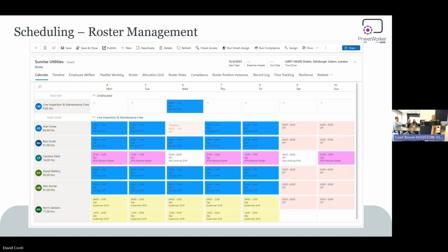When we're looking at offshore, this is quite a critical metric, because it's not just how many people I need to do this work, but I've got a maximum heads on bed that I can have on the rig. So I've got to adjust my staffing to account for that. Less critical roles might actually get shipped off so we can get this particular maintenance done. And there are plenty of other sources, such as Excel spreadsheets, for our demand for staff.